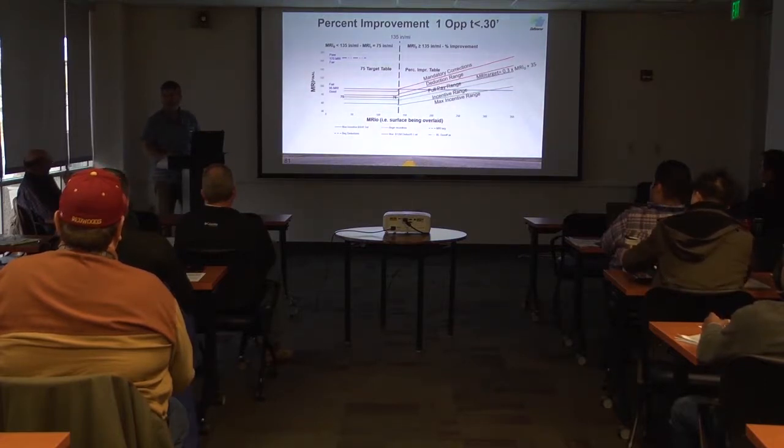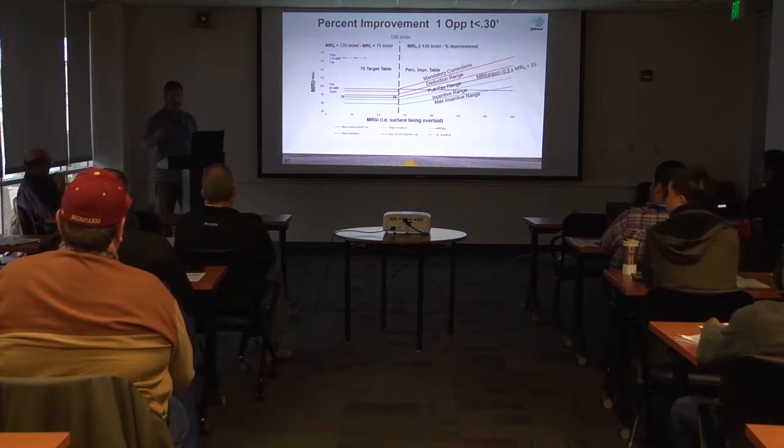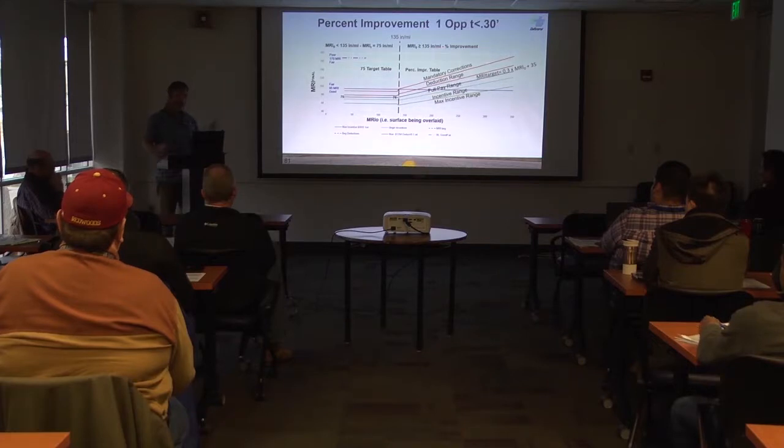If I have to mill out and pave back in the same shift, which is how our specs default, that's not an opportunity. You could talk to everybody in the world and they'll say that's some type of opportunity, but it's not in our specs.